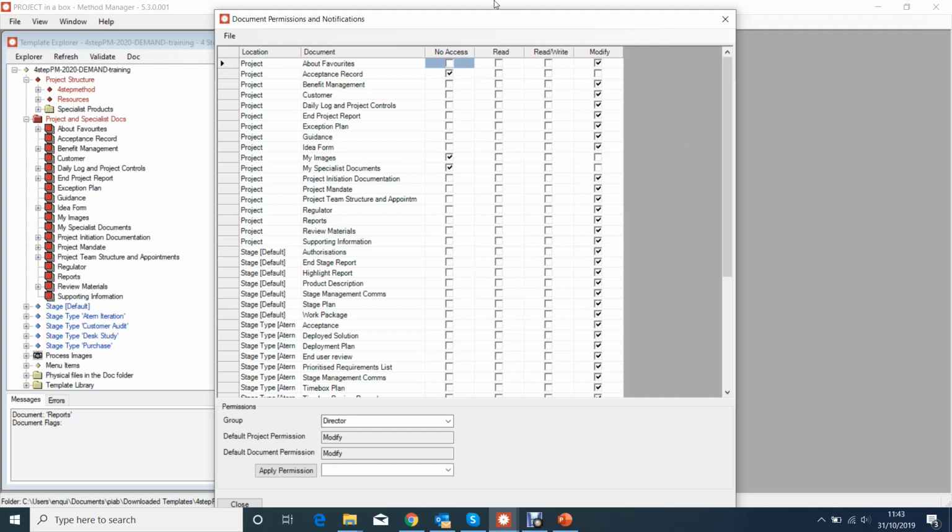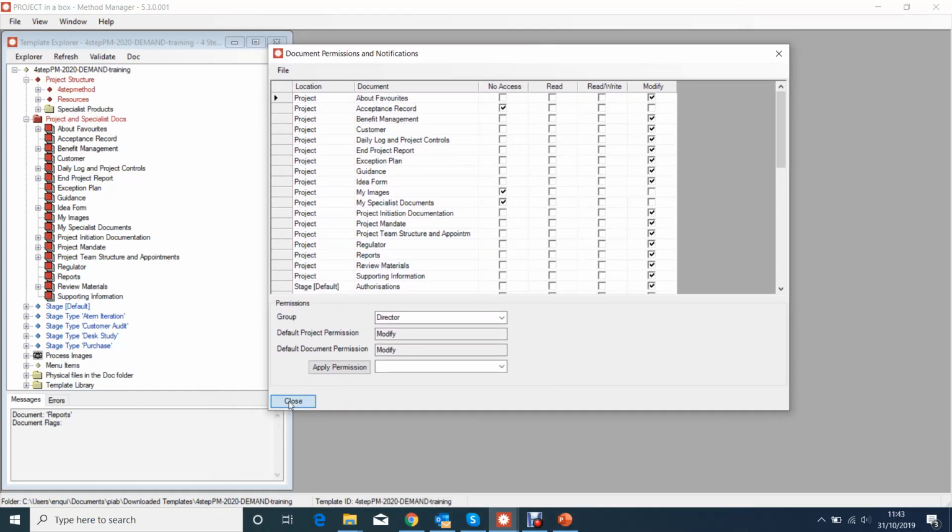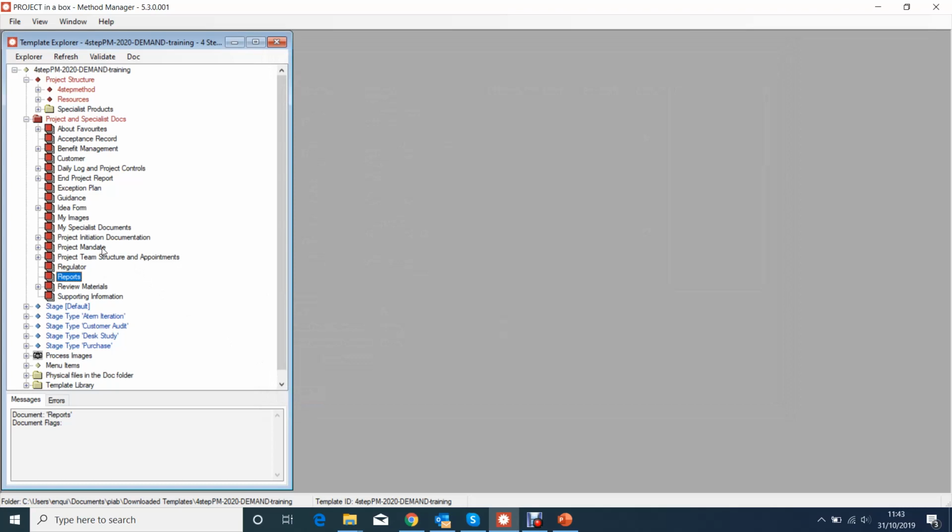So this is really powerful if you want to personalize the experience of users within the project. They're going to get the things that you've set up for them there. So that's definitely worth investigating if you're going to be sensitive with documents and audiences. And pre-setting those permissions groups makes it easier for the project managers, even if they're not going to use them straight away. There's already a supplier group set up, so they don't have to go and work out how to do it. They just have to allocate people to the supplier group to restrict their permissions on not seeing things like finance documents.